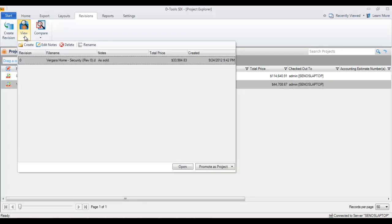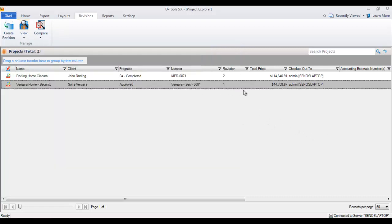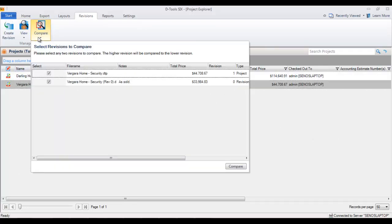You can actually see the comparison. This revision one is at 447, this is at 339, and so this is also marked as sold. Obviously this is a revision that was created once the project was sold, and then changes have taken place since then. You can compare any two revisions against each other.